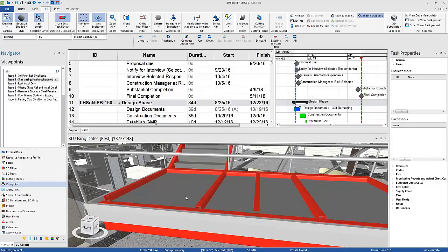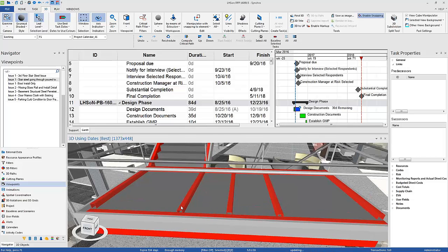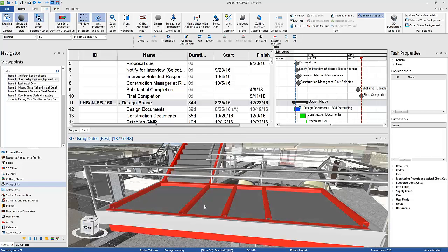So here's what's important. Yeah, I could maybe run this in a clash detection, but a lot of times we don't start opening up Navisworks and validating until construction documents are done, or 50% construction documents are done. And right now we're so early on in design. This is really just visually catching issues, because when you're building a 4D schedule, you're looking at every stairwell, hallway,